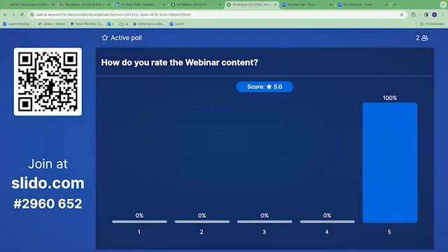Yeah, another quick question from your answer. You mentioned involving stakeholders at the demo, right? Are you referring to the system demo or an iteration demo? So iteration demo happens within your team. Yes. So you can always invite whoever needs to participate there, but mostly it's your team. But your system demo is where it happens across the ART, the whole 5 to 12 teams, 50 to 125 people coming together and watching together. And you're inviting customers, you're inviting stakeholders, the business owners who will be looking at the entire product to give their feedback.